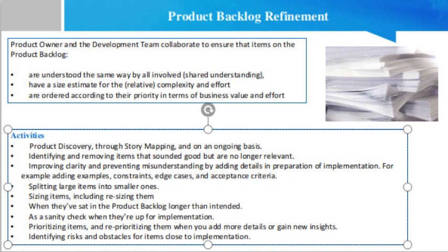And still others do it mid-iteration and alternate the backlog refinement and sprint planning meetings. If you think you shouldn't do it near the end of a sprint, you are probably cutting refinement too close. You really should have at least 2 or 3 sprints' worth of fully refined items. That also ensures you have ample time to answer any questions.